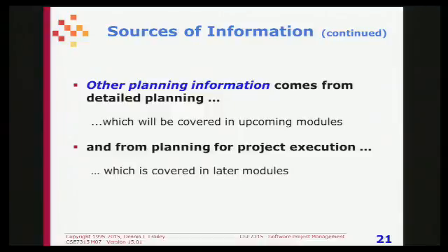So the detailed planning that you do will create additional potential risks. And the way risks work, just so you know, life is full of risks. You typically make this big, long list of all potential risks, and then you go through a process called prioritization, where you say, which ones really should I be worried about? And let's say you have 100 risks, and then you say, oh, the top 10 are the ones that I really need to worry about. And then you have a risk plan that focuses on the top 10. We'll say more about that later.